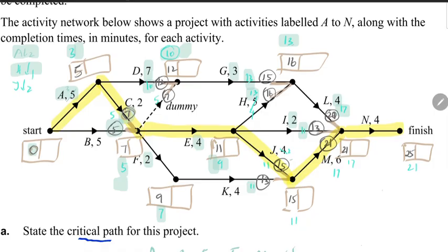So let's try and come along the other activities. 9, the earliest starting time of J, plus the current value of 4 will give me 13. Now if I reduce that by 2 and make it 2 instead, I will get now 9 plus 2 is 11, and so my new choice is 11.